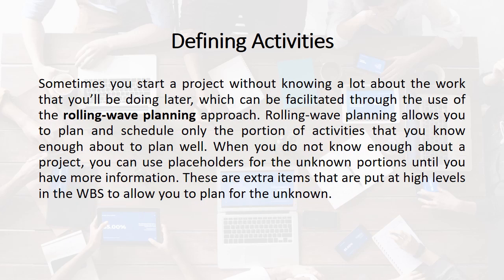Sometimes you start a project without knowing a lot about the work that you'll be doing later, which can be facilitated through the use of the rolling wave planning approach. Rolling wave planning allows you to plan and schedule only the portion of activities that you know enough about to plan well. When you do not know enough about a project, you can use placeholders for more information. These are extra items that are put at high levels in the WBS to allow you to plan for the